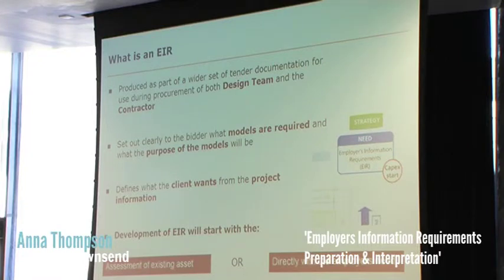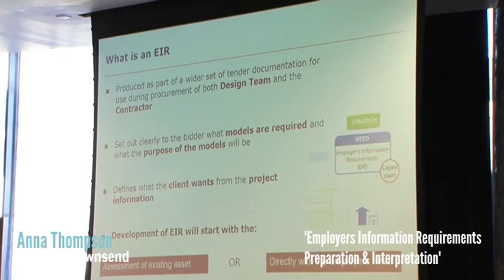So the development of the EIR starts either with the assessment of an existing asset, leading to the development of the employer's needs, or directly with the employer's needs if no existing asset or no asset information model is to be considered.